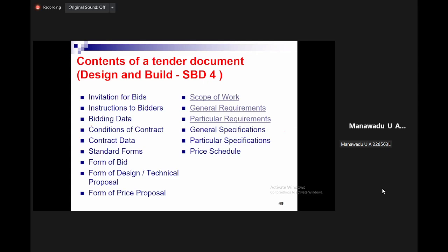We have to re-tender it, or we can open that under minor procurement or major procurement? We can open if there is one. Why? If you have given sufficient publicity, say if you have given a newspaper advertisement, then you can open it and proceed with the tendering for that. That is allowed in the government sector. But sometimes if we feel that that bidder is not that suitable, then we have to write and do re-tendering. It will be a huge cost.